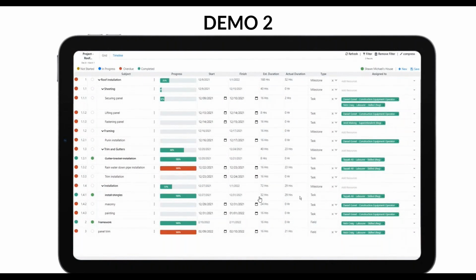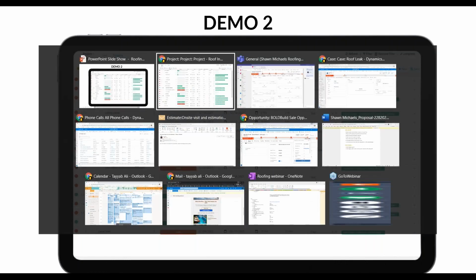It was a 32-hour estimated, and it's green because I did it in less time. You see here, if I did it in more time, it would be 100% red. So that is kind of showcasing to you that if I complete a task which I go over, then although it's showing me 100%, it is keeping it as red, but this one, it is keeping it as green because I did it under budgeted time at least. So this is the second piece that I wanted to showcase, and kind of the whole thing applies to the details that you can imagine in here.